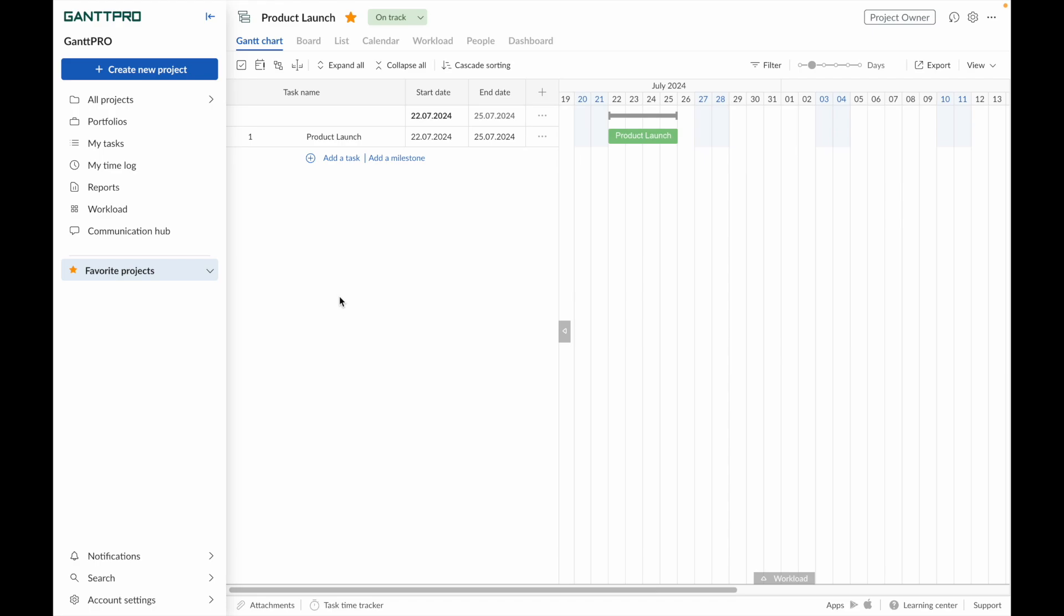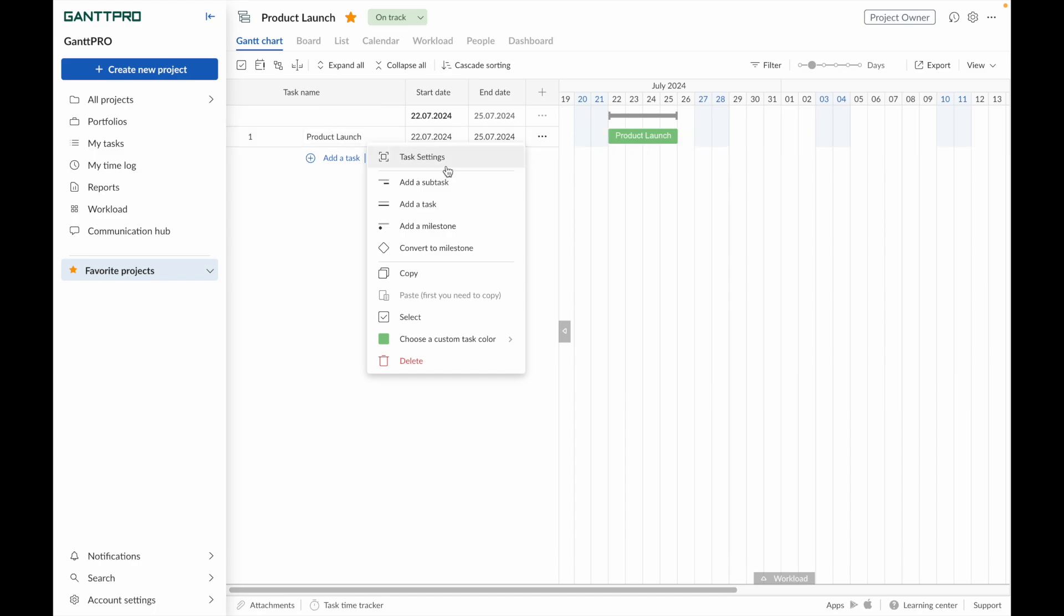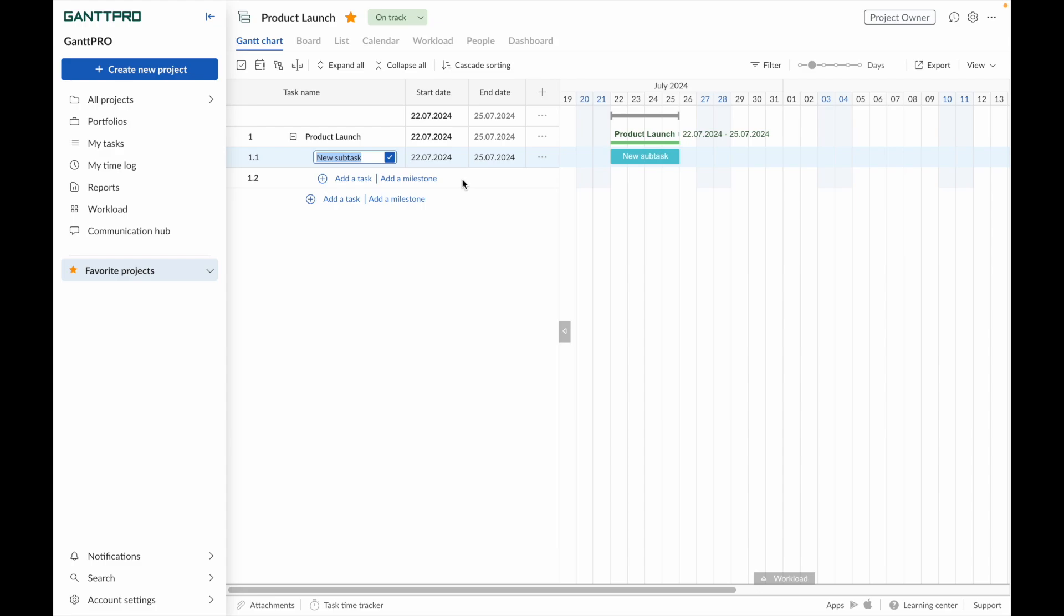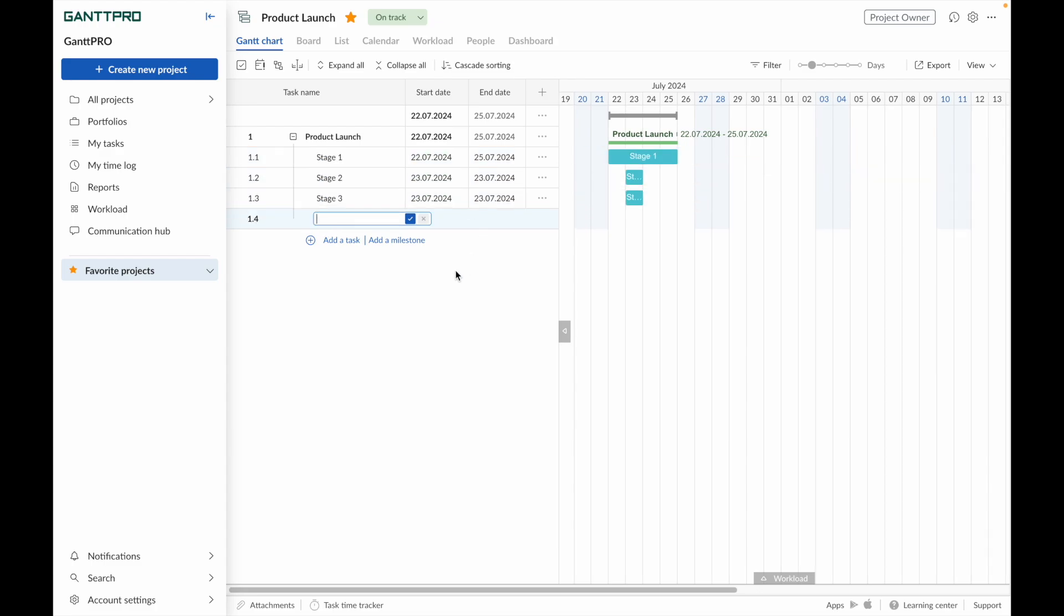To create a subtask, right-click on the task and you will see the context menu. Next, select the Add a Subtask option. Enter a task name and press Enter on the keyboard for quick saving and entry of new ones. Our task becomes a summary task and consists of subtasks.